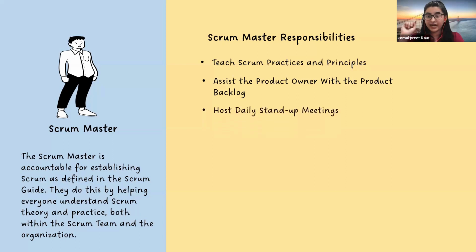Then he hosts daily stand-up meetings. So daily stand-up meetings, normally we say it as a daily Scrum meeting that lasts for 15 minutes. So normally when teams start their day on the working days, they have to explain what tasks they have done the last day and what tasks they can cover today. So the Scrum Master hosts those meetings as well.